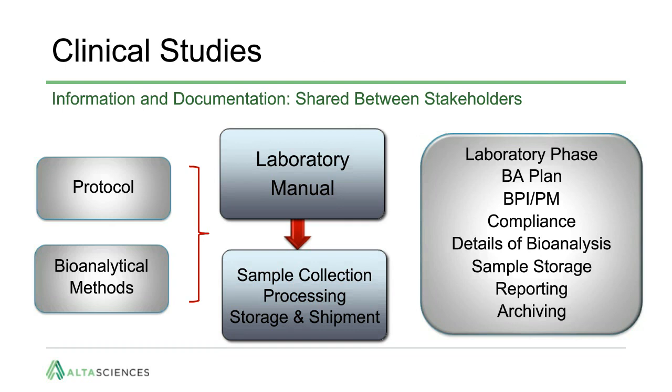Clinical protocols are sparse regarding bioanalysis details. The bioanalytical methods in alignment with the protocol need to be determined. The information on sample collection, processing, and storage and shipment is often included in the laboratory manual or similar document. The bioanalysis details are included in laboratory phase plans or bioplans, which include the assigned scientist, the details of the bioanalysis, the methods and the validation references, sample storage at the laboratory, and references to reporting and archiving.